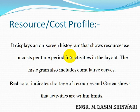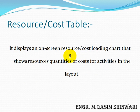Red color indicates shortage of resources, while green shows that activities which are in limits. Second topic we have to cover is Resource or Cost Table. It displays an on-screen resource or cost loading chart that shows resources, quantities or costs for activities in the layout.